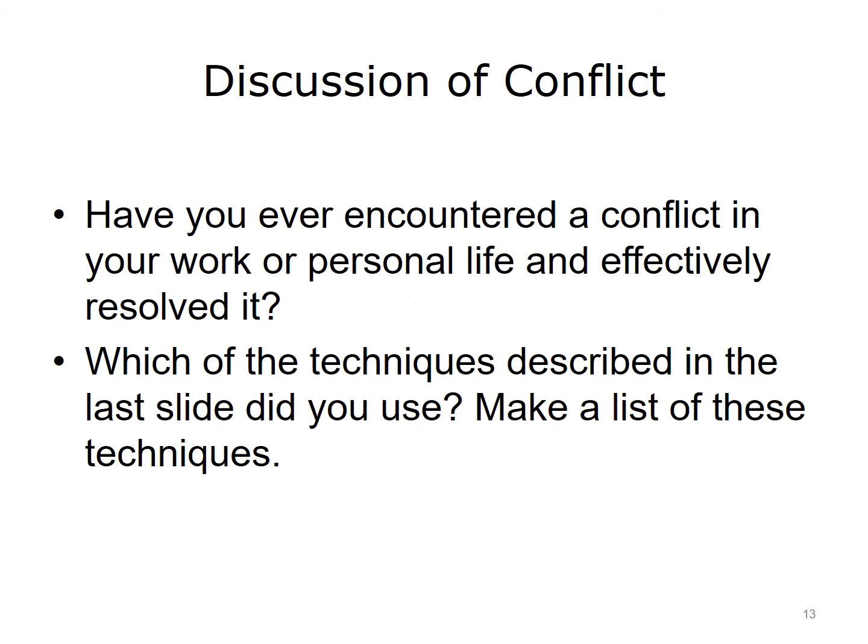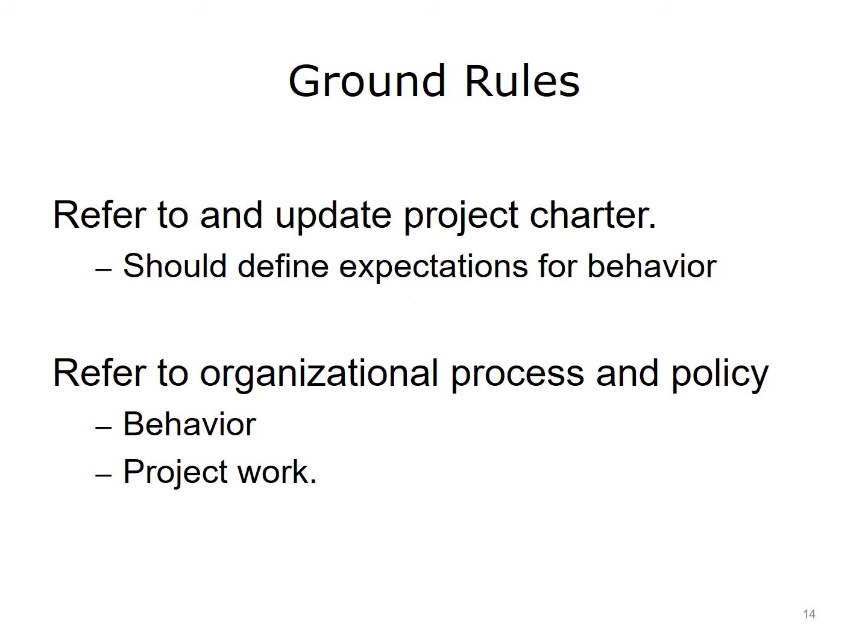Consider a conflict in your work or personal life and which of the techniques described you might use. Ground rules will provide clear protocols for behavior and project work, and often provide processes for how to deal with behavior outside of the defined ground rules. Ground rules are typically defined in the project charter and are based on existing organizational process and policy. They should be established early on and updated as necessary throughout the project, and must be agreed upon and bought into by all team members.